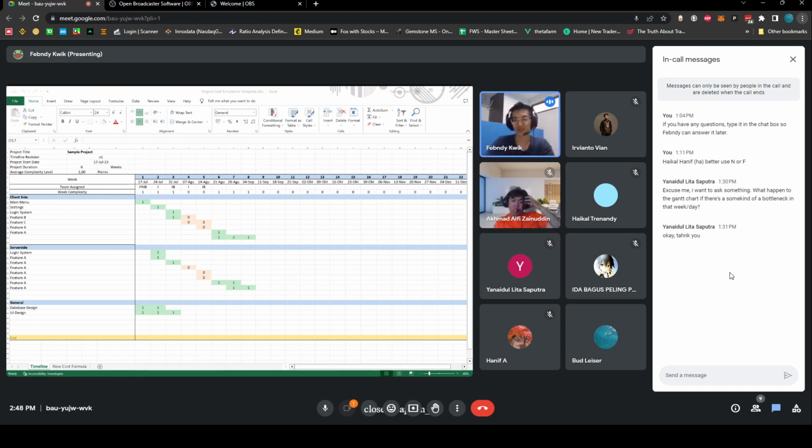Sometimes you can do that switch, or sometimes you can add more people, meaning like, okay, if this doesn't work, then you add more people to help with this part, or help with this part, and so on. So to answer that, planning is the main thing you can do to prevent those delays. Don't plan too optimistically. You have to plan a little bit more pessimistically, but don't make it too pessimistic as well, because you're going to be bloating the timeline.